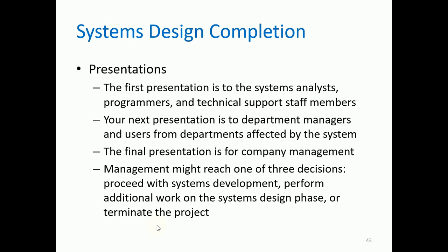Next we have presentations. The first presentation is to the systems analysts, programmers, and technical support staff members. Your next presentation is to department managers and users from departments affected by the system. And then the final presentation is for company management. Management might reach one of three decisions: proceed with systems development, perform additional work on the systems design phase if they want additional information or want to incorporate their suggestions and recommendations, or, worst case, terminate the project.